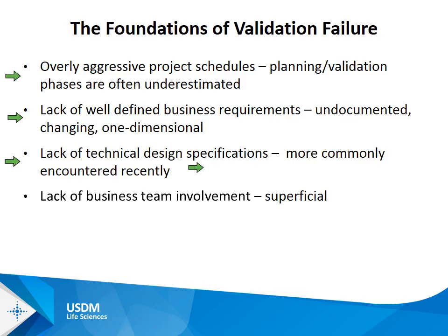Then when you start talking about technical design specifications that are necessary to be referenced in the validation process itself to support things like data migrations and configurations and integrations, this is becoming more and more a black spot on many projects where whatever methodology was used to develop the system technically does not meet the standards that are necessary to be in place for validation. And finding this late is a cause of great delays, and often functional problems.